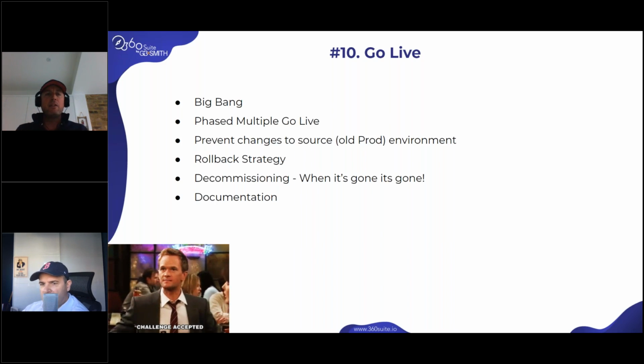That's big, man. The phase multiple go live, the bigger companies with a lot of teams may prefer to do this, and that's great. But again, you have to be careful. If you just promote a folder, you promoted it without security. Same thing, if you promote a universe, it comes without security, without restrictions. You need to bring the groups and the users at the same time. But you might have issues if these groups or these users were already migrated as part of a previous phase migration. So again, this is where the planning and the practicing will help you.